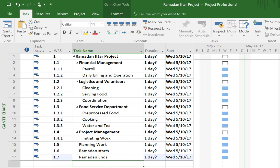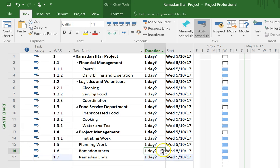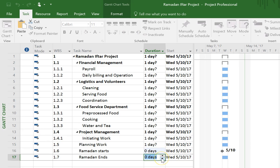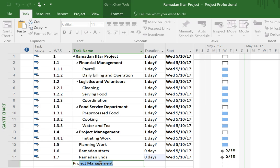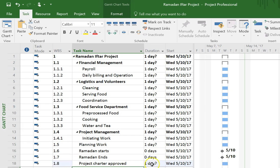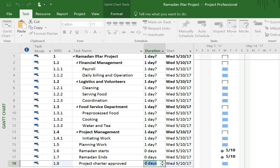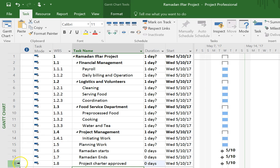Because those are actual milestone dates, I'm going to make them zero-duration tasks. You can see that they became milestones instead of regular tasks. The other thing I want is a date that the project charter is approved. I don't know what date that's going to be yet, but it's definitely going to be the date that most of my things start on. So I'll go ahead and make it a milestone — the day the project charter is approved — and that means task row 18 is going to be a very important row as my scheduling goes on, because most things will be scheduled from the date the project charter is approved.